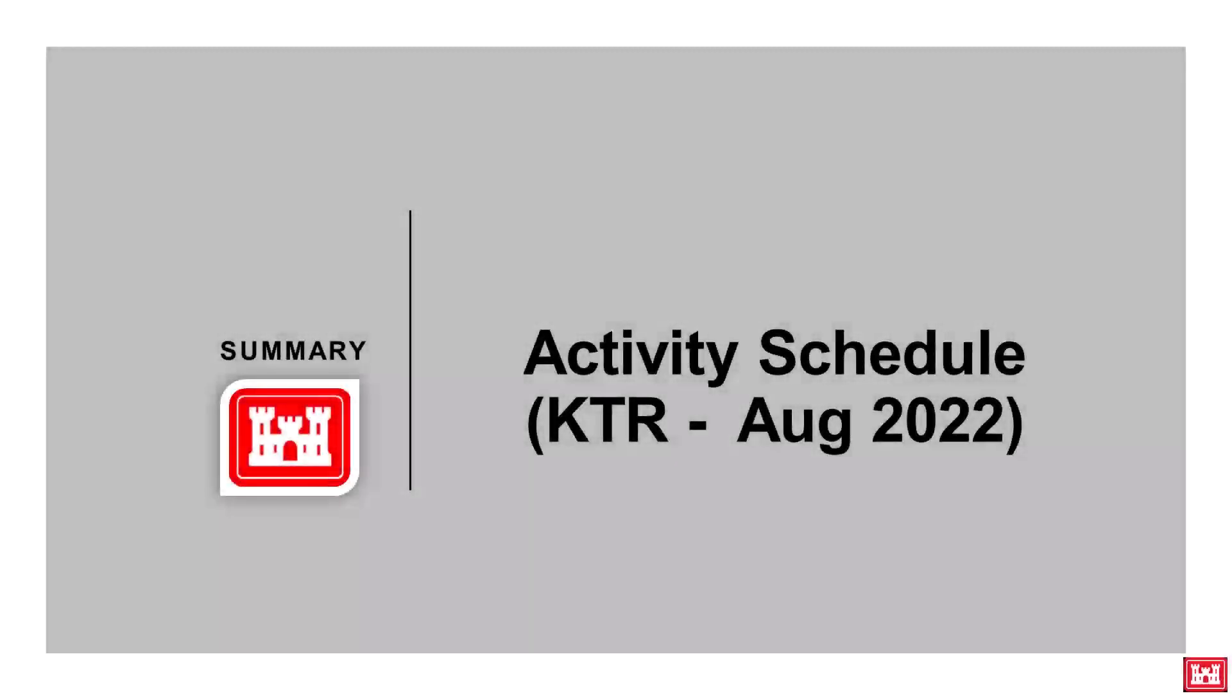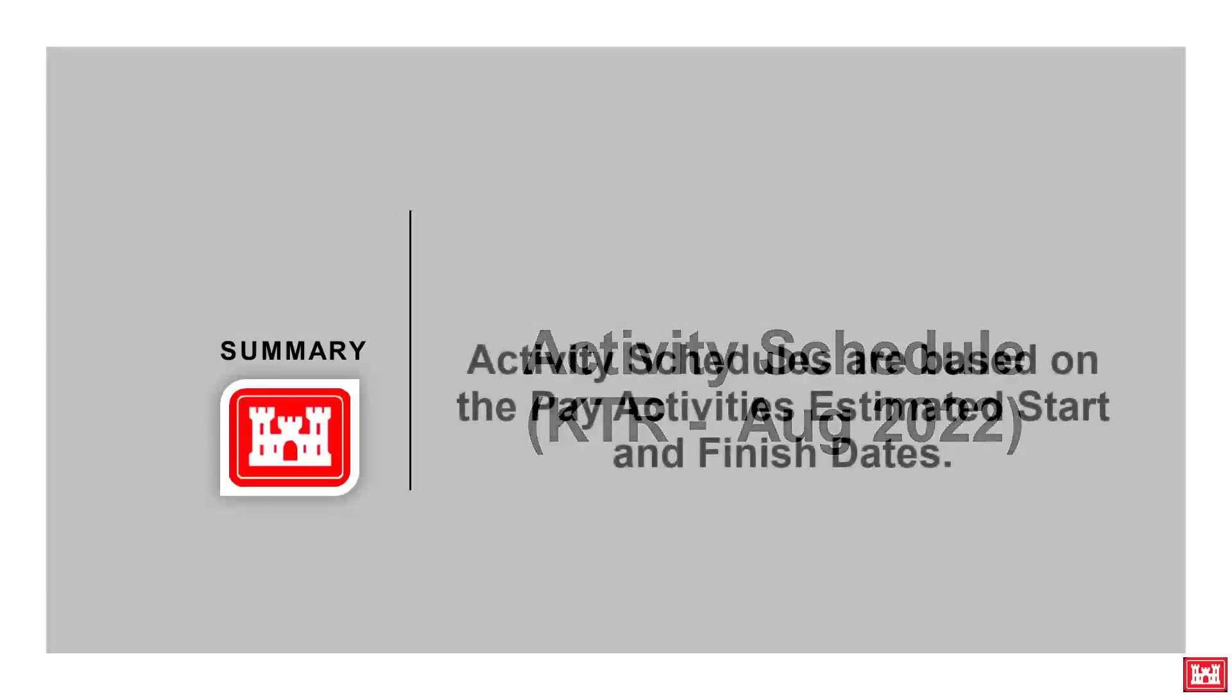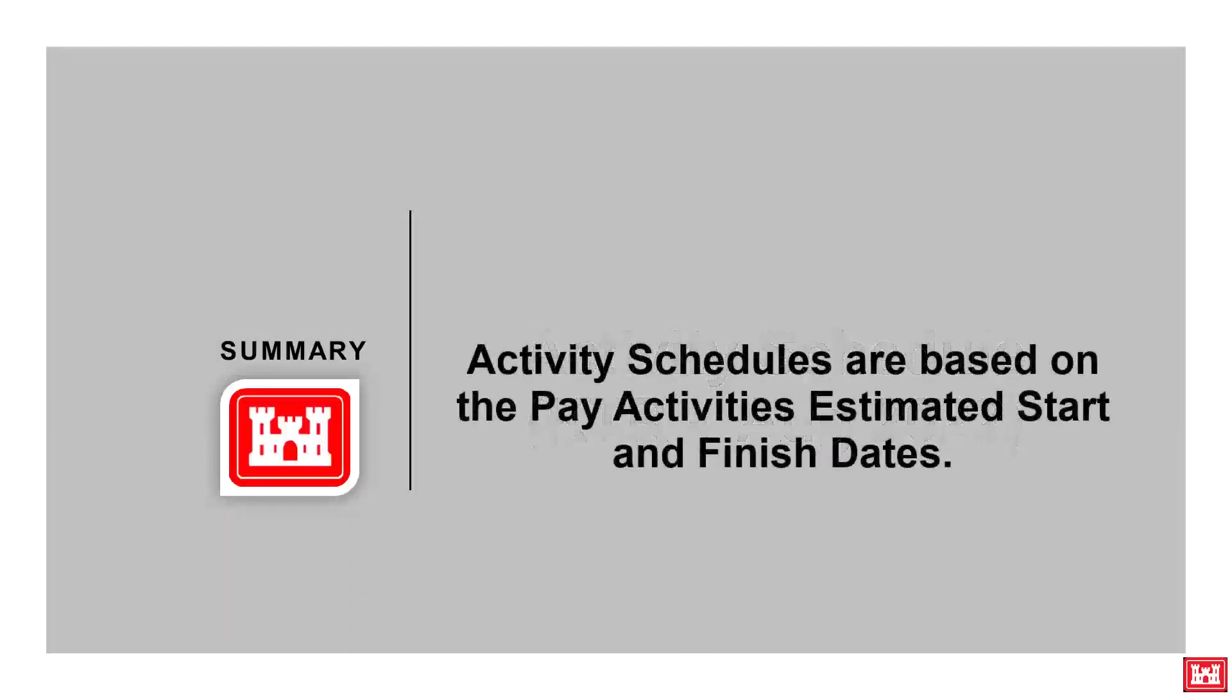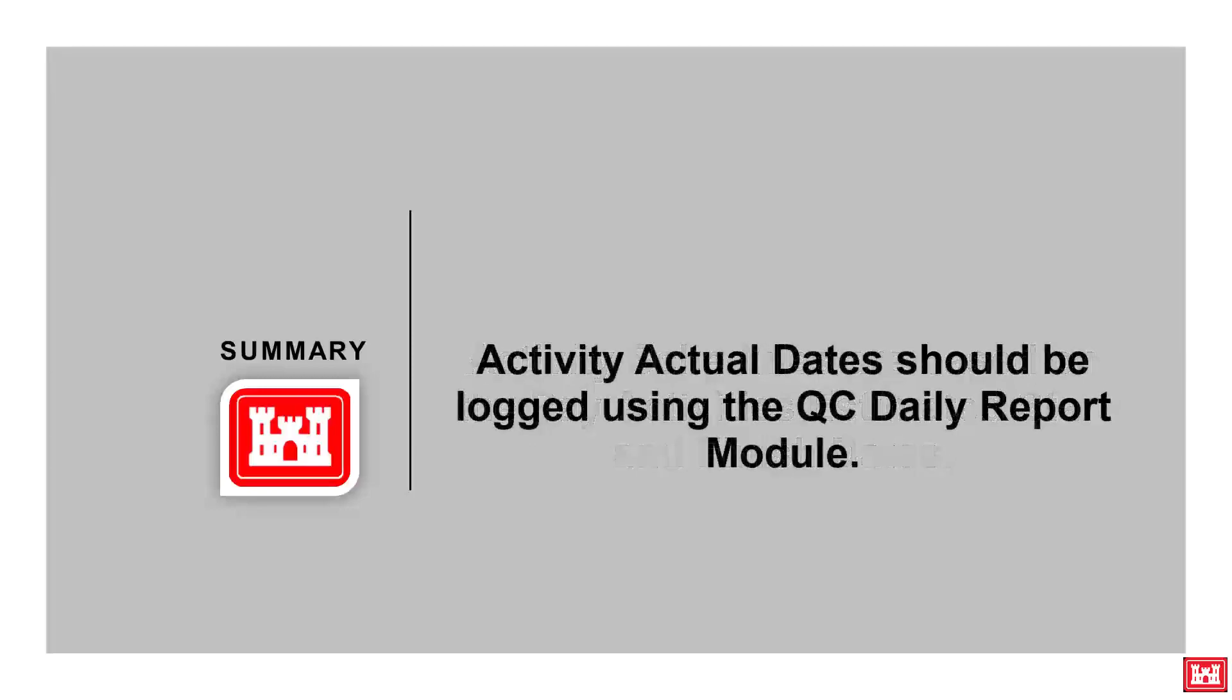In summary, we discussed the activity schedule and how it corresponds within RMS. As a reminder, activity schedules are based on the pay activities estimated start and finish dates. Activity actual dates should be logged using the QC daily report module.